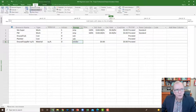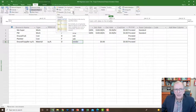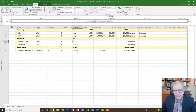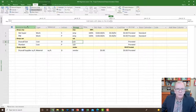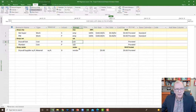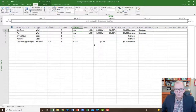If I go to the View tab, the highlight, filter, and group-by options are very useful as you get more familiar with the program. I'll go to 'Group By: Resource Group' since I just set up the resource group — and it puts everything into neat categories. You can imagine if you had 100 resources, it'd be nice to have all employees in one area, all subs in one area, and vendors in one area. And if you get tired of that grouping, just select 'No Group' and it returns to normal.